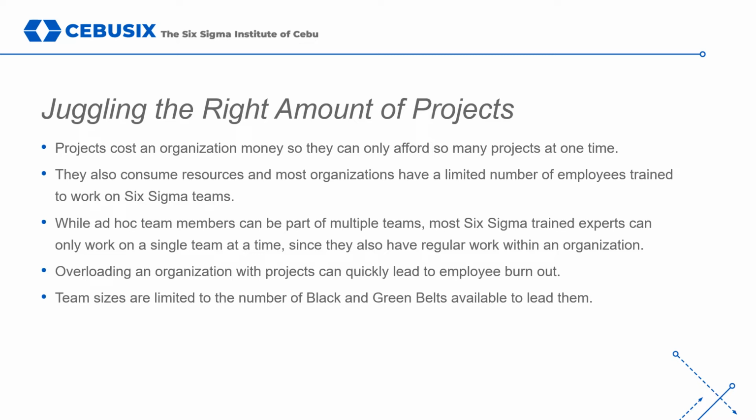While project work, including data gathering and analysis, might be handled by employees committed 100% to improvement projects, teams usually have to engage with and pull resources from regular staff members. An organization that juggles too many projects puts daily output at risk. In seeking to improve processes, a company that selects too many projects at one time could actually negatively impact quality.